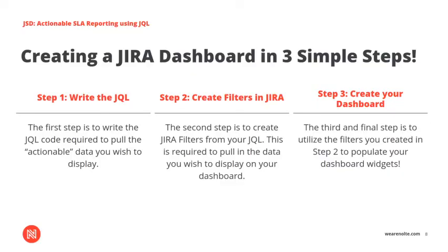So after I determined what data to collect and which functions would be helpful to get this information, I started building out my dashboard. The first step was to write the JQL required to pull the actionable data that I wished to display. The second step was creating the filters in JIRA. This is required to pull in the data that you wish to display in your dashboard. And step 3 was creating the dashboard.